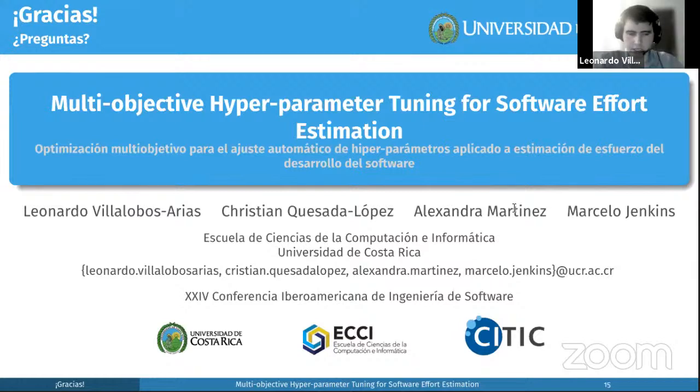I'm going to respond in English. What I recommend is not doing what we did in this study, not using 14 different algorithms, but using, in general terms, one genetic algorithm, because as we saw, 2 genetic algorithms were the best on log SVR. I recommend also using one heuristic method. In this case, Flash FS was the better. And I also recommend using one for baseline, for example, random search or grid search, depending on how much processing power you have. But I'd say those 3 are maybe what you should use for your software effort estimation data. So genetic algorithms, Flash, and random search or grid search.